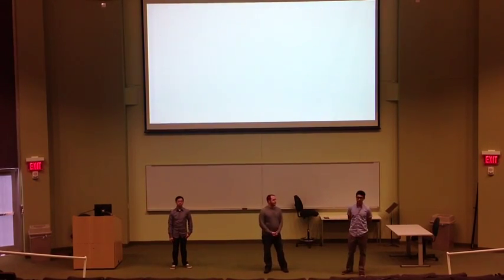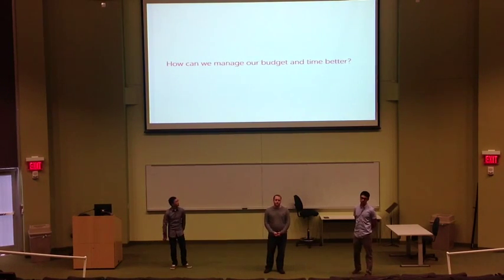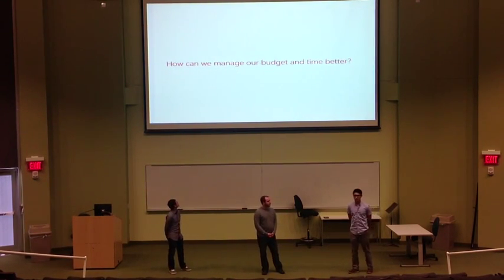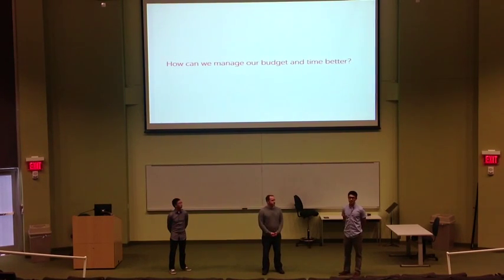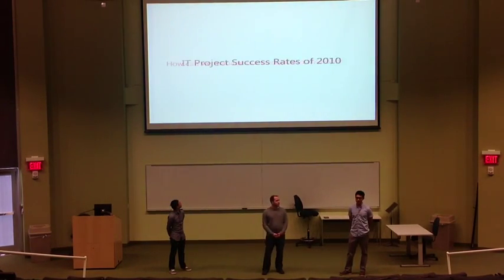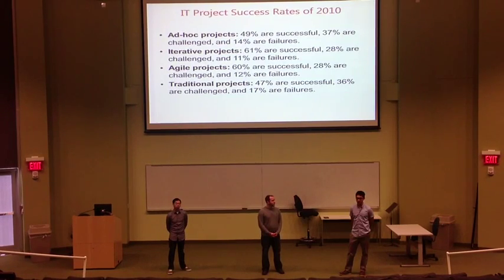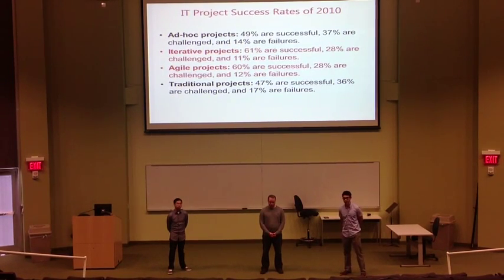Adaptive and iterative project management allows the project to be changed and adapted to the changing realities of the actual project. In the process of development, everything gets broken down into smaller sections, and basically every 2 weeks a sprint or iteration is delivered, and the development of the project will change according to how everything is progressing or adapting to the environment around it. So it gives the team a chance to adapt based on each sprint or iteration.